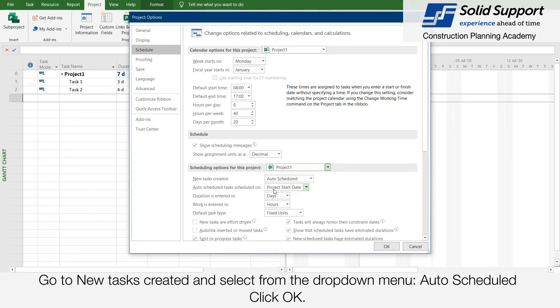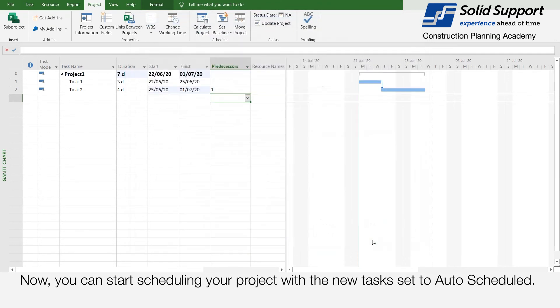Go to New Task Created and select from the drop-down menu: Auto Schedule. Click OK. Now you can start scheduling your project with new tasks set to Auto Schedule.